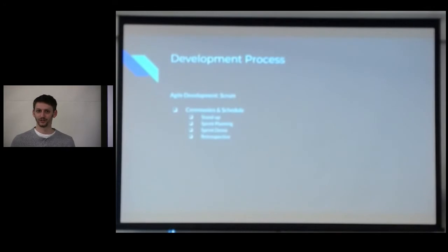So it's great because we can meet with them frequently and we can give them status updates, and basically talk to them about requirements and if what we're working on is correct or not. First Monday of the sprint is always sprint planning, so we plan out our work for the week, make sure that our sponsors are aware of what we're going to accomplish throughout the sprint. Then the second Monday of the sprint is usually backlog grooming and just sort of determining if we're on the right track or not, if we need to move some requirements around.